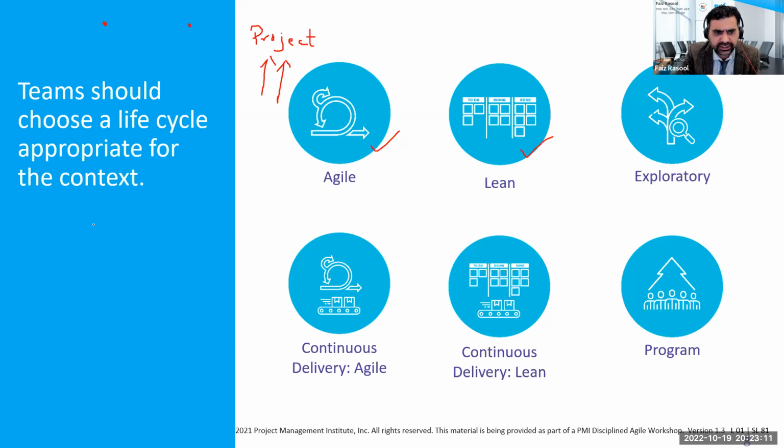The thing is, you know that Agile talks about this inverted triangle. The way we fund is one of the main reasons we really couldn't do Agile. We must understand this. If you always have a set scope, and then you try to achieve this set scope within a budget and schedule, this is a pure waterfall example. This is not the right way to fund in Agile. In Agile, the right way of funding is you have a set budget, a set schedule, and then you try to achieve the scope. This is scope at the bottom. You try to achieve as much scope as possible.